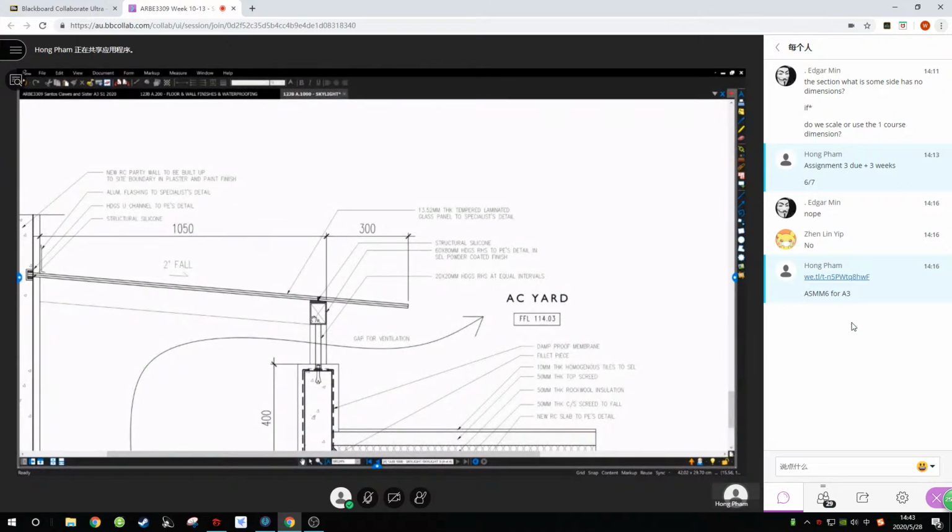So the way you describe is very important, okay, to prevent any dispute, because just in case you forgot to price for these items and they aren't in the bills, later on you might be told that because you didn't discuss these items, or your item is not clear.